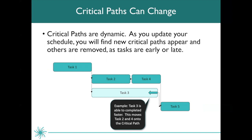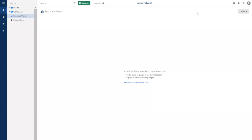Critical paths are dynamic and can change. If we added resources to task 3 and made it shorter than task 2 and task 4 combined, we'd have a new critical path: task 1, task 2, task 4, and task 5. I'm going to show you how to view your critical path in Smartsheet. First, go ahead and log into Smartsheet at www.smartsheet.com. I encourage you to follow along — if you do not have a Smartsheet account, you can sign up for a free 30-day trial. I've included the link in the description. If you do have an account, simply log in.